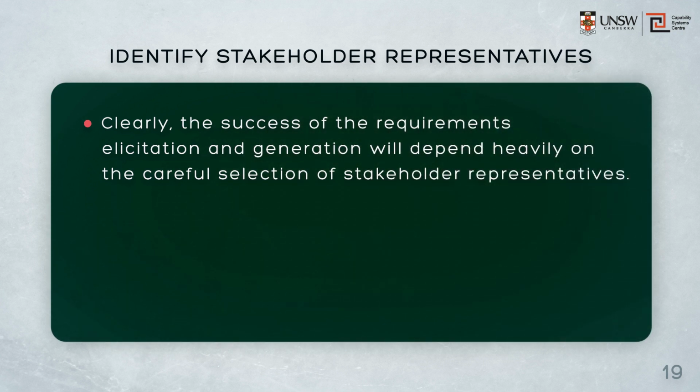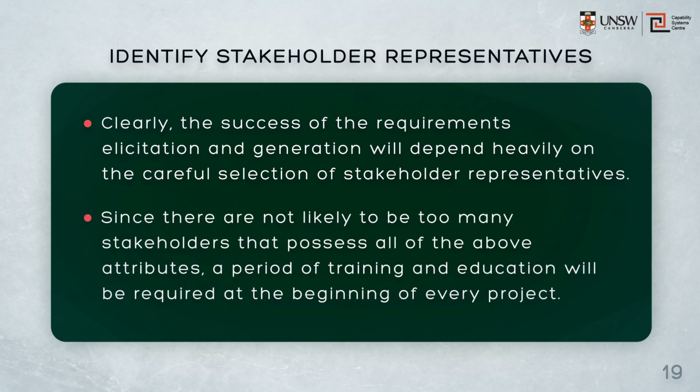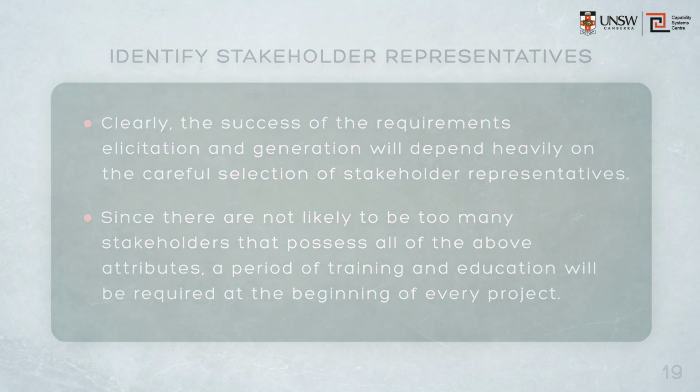Clearly, the success of the requirements engineering process, particularly the elicitation and generation, will depend heavily on the careful selection of stakeholder representatives. Even then, since there are not likely to be too many stakeholders that possess all of the attributes we saw before, a period of training and education will be required at the beginning of every project to ensure that stakeholders are aware of the requirements engineering processes that we're going to implement.